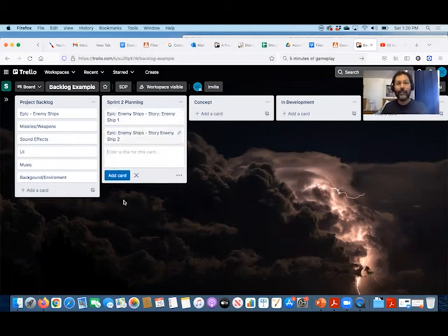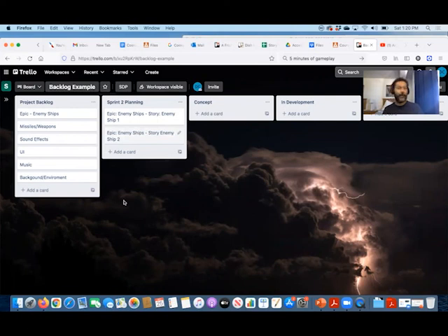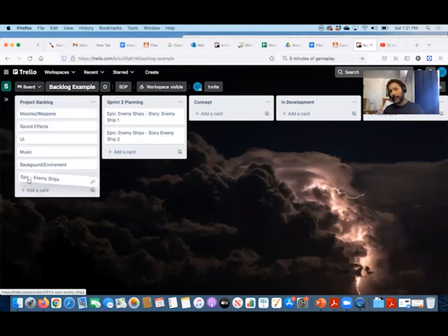So let's just focus on those 2 for our sprint, because if we have more time, great, make more, but otherwise, we at least have 2, right? We have a game with just 2, and then we might reprioritize this epic after the sprint's completed to go, you know what, we want to get these other things down first. You might not want to put it at the bottom. Maybe it's still more important than background to have 3 or 4 enemies, but now we know before we do that, we want to work on missiles, sound effects, UI, and music. Then we'll look at making more enemy ships.